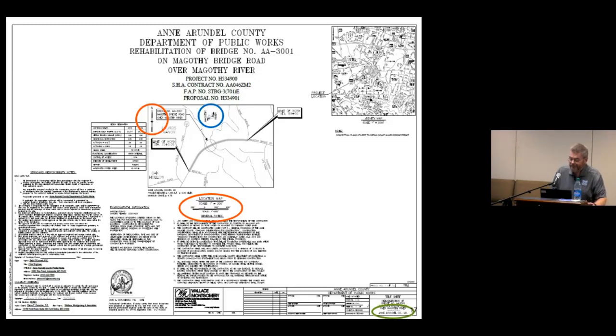Now remember, the purpose of a Coast Guard plan sheet isn't for construction purposes. These are not construction grade. They're informational and are intended to clearly depict the project and its proposed clearances in a manner that the general public can understand. Not engineers, but the general public.